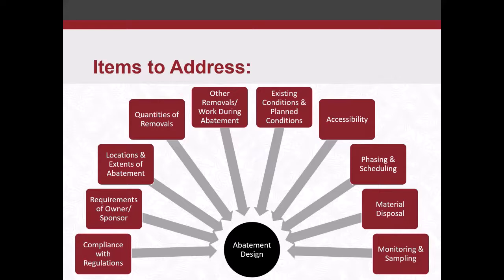This might be, if you've got some flooring to abate, you may have cabinetry or other things that are covering that flooring. So you want to describe that it has to be removed as well by the abatement contractor. There may be other things like that. It may be preferential just to take it out during abatement rather than have it left over for demo.